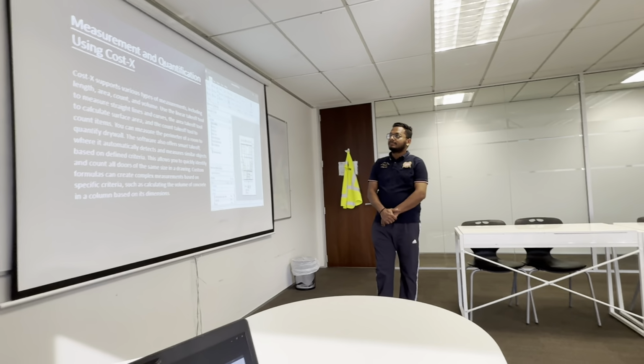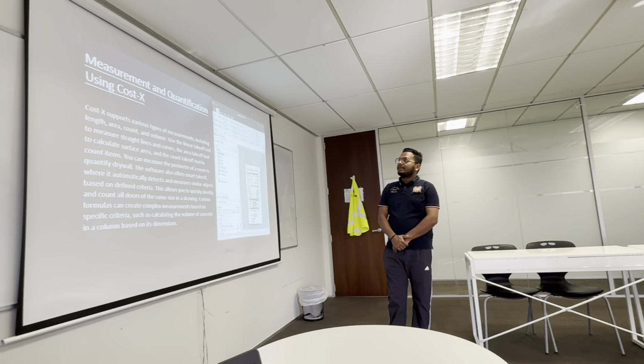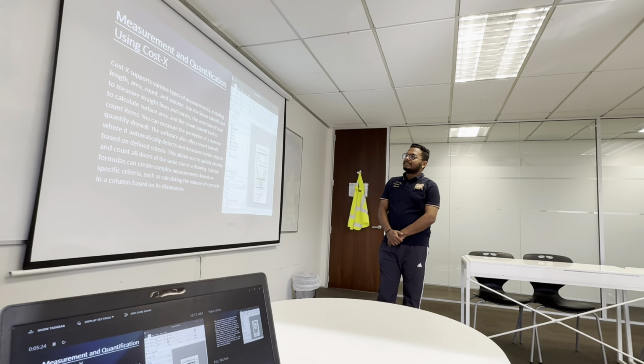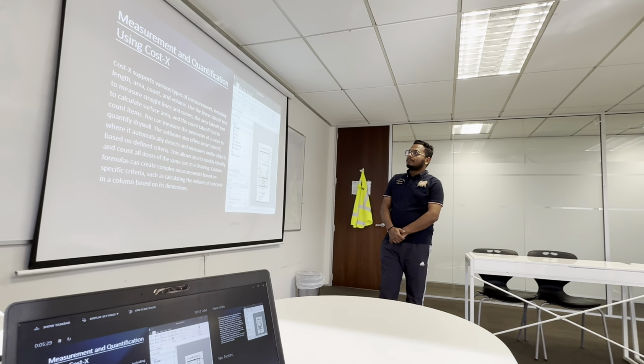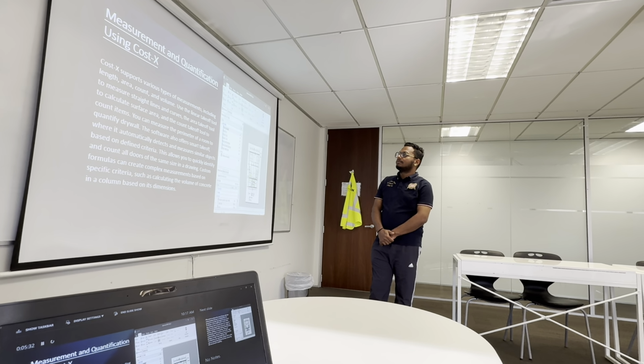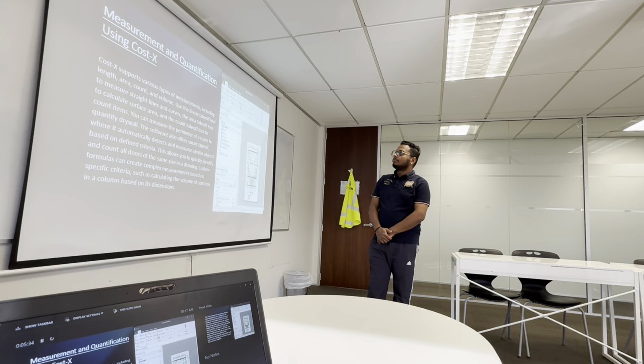So in this slide, measurement and quantification using Costex. Costex supports various types of measurements including length, area, count, and volume. Use the linear takeoff tool to measure straight lines and curves, the area takeoff tool to calculate surface area, and the count takeoff tool to count items. You can measure the perimeter of a room to quantify drawing walls.